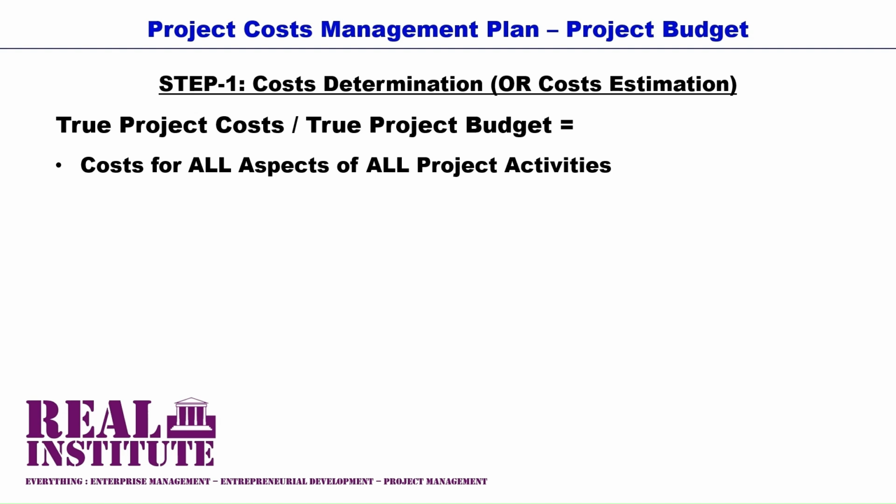In our case example, the project manager will list all the required material resources, capital resources, and human resources for each project activity in the project schedule. The required resources will be listed in terms of the required types and quantities, or complements in terms of the human resources. Then the project manager will determine or estimate the cost for each resource by way of common sense options that have just been stated.